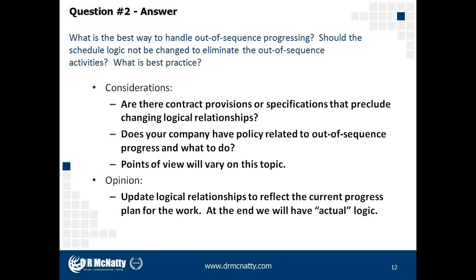So to answer question number 2, what is the best practice? I think these are all questions that can be debated, but I do like the idea and believe that where it's possible and allowed, updating the relationships around the data date and progress activities is a process that I would definitely support.